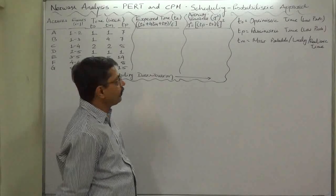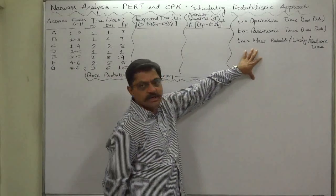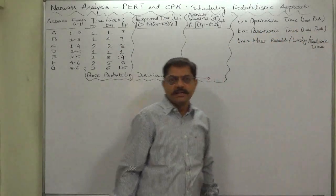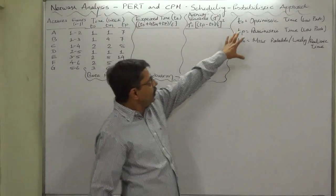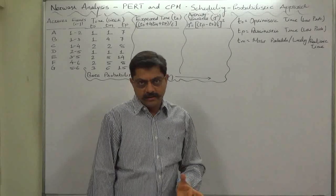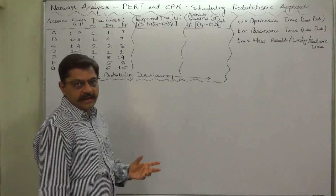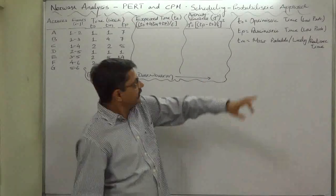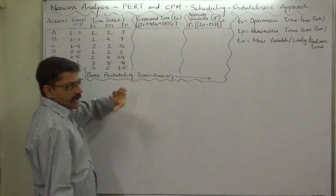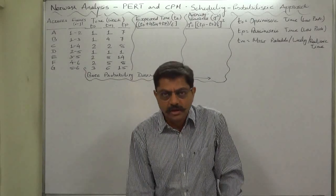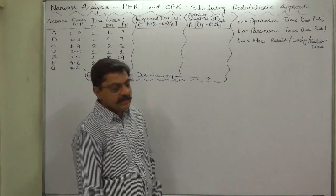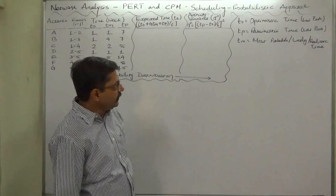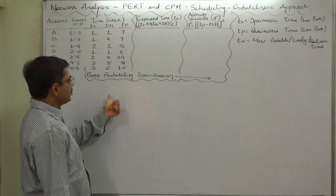According to the beta probability distribution, the estimate of time is made in such a way that three different types of time consumptions are considered for each activity. The first is TO, that is optimistic time — its probability is very low. If all circumstances are in favor, the time in which an activity can be completed is called optimistic time. The exactly opposite is TP, pessimistic time — if everything goes unfavorable, that is the duration in which the activity can be completed. The optimistic time also has very low probability according to the beta probability distribution.